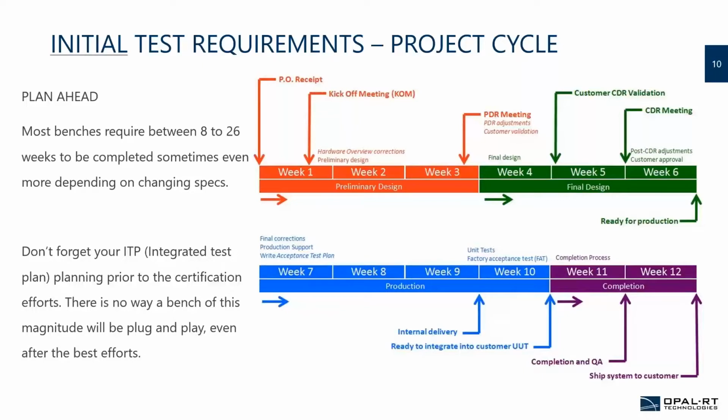So it's not uncommon that the specs that were given are not necessarily matching the design of the ECU that was done, and we need to make some adjustments before going to the actual test phases. So you need to plan for an integrated test plan before starting your tests.